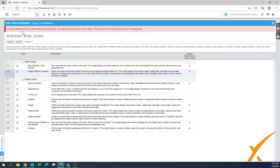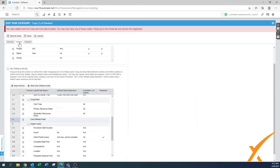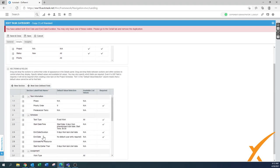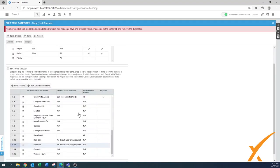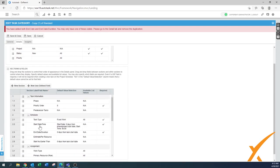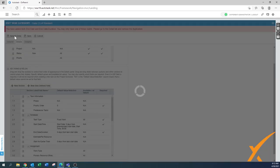Pressing save gives an error: you have added both end date and end date duration — you may only have one of these visible. That's something the system controls. Going back, the end date duration and end date are a combined field, so end date is not needed separately. We move end date to hidden along with start date, since we now have start time and end date duration displayed. Now press save and close — and it saves successfully.